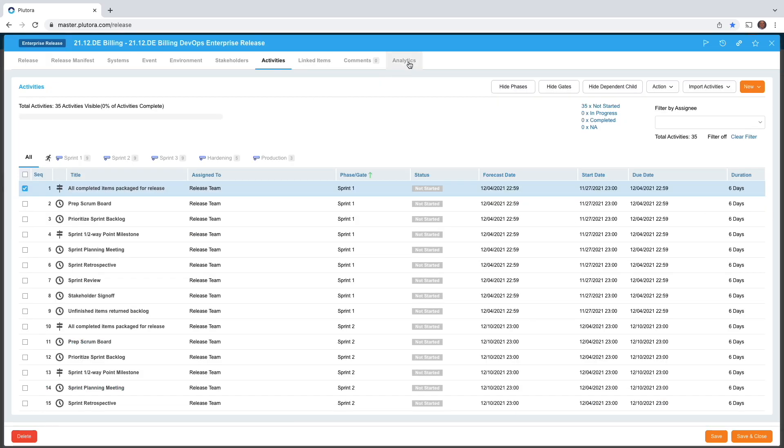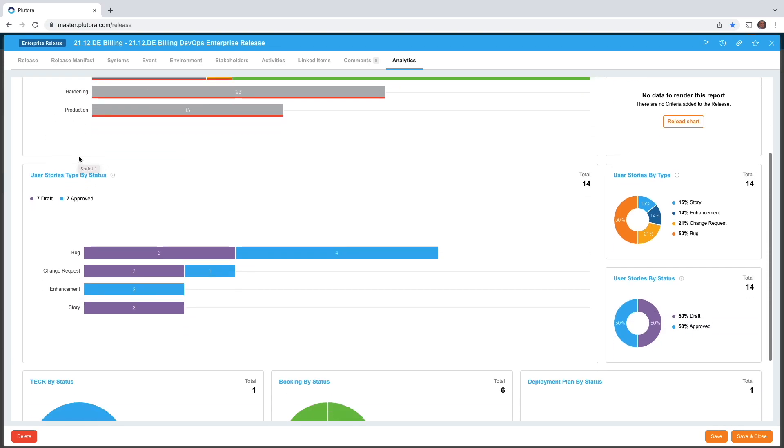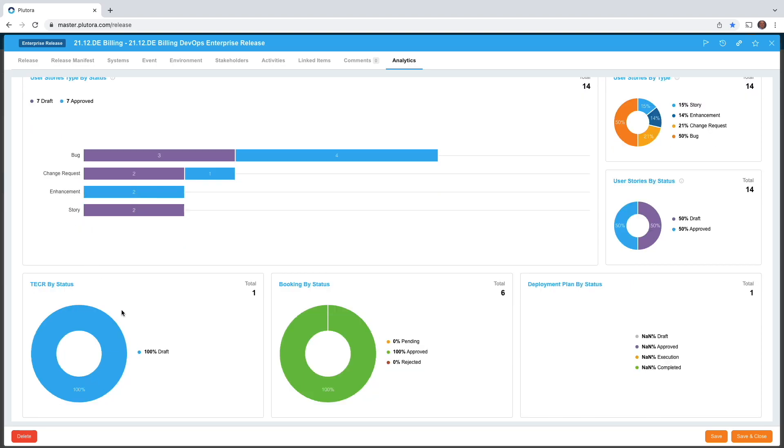You'll also notice an analytics tab for enterprise releases. What the analytics tab is doing is rolling up the status of all the project releases. So you can see the phase and gate progress and the user story progress by type.